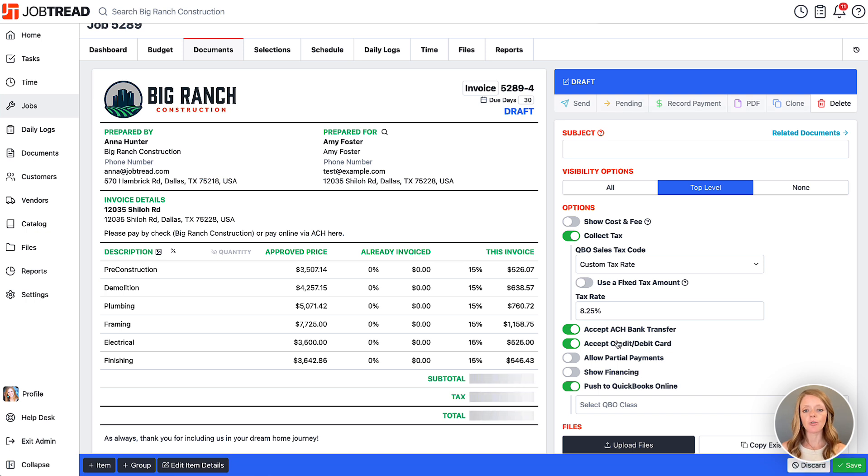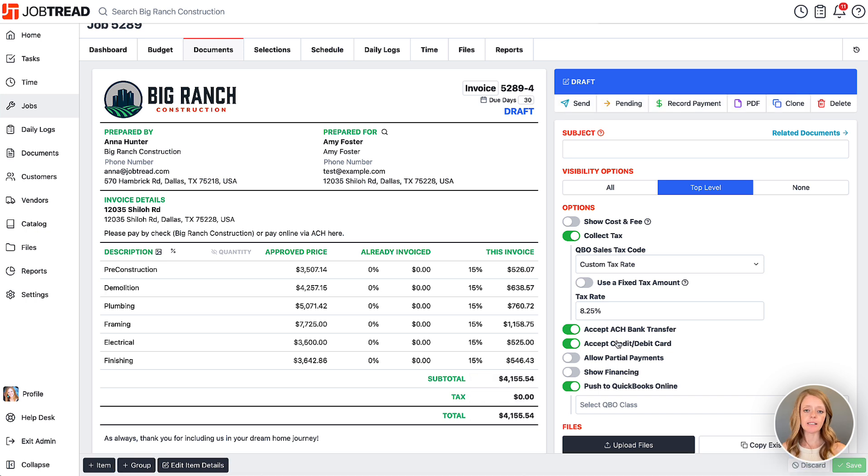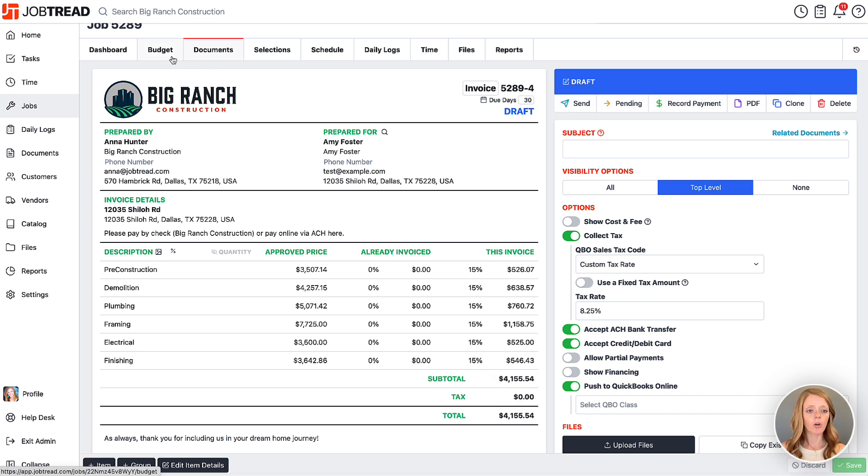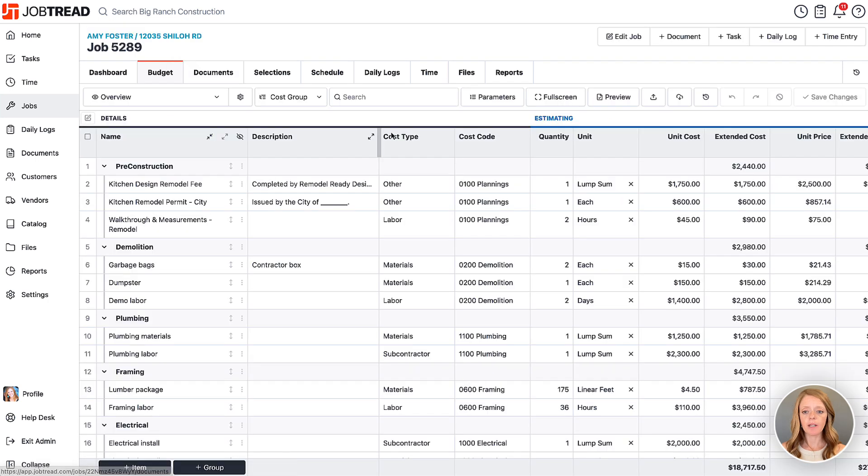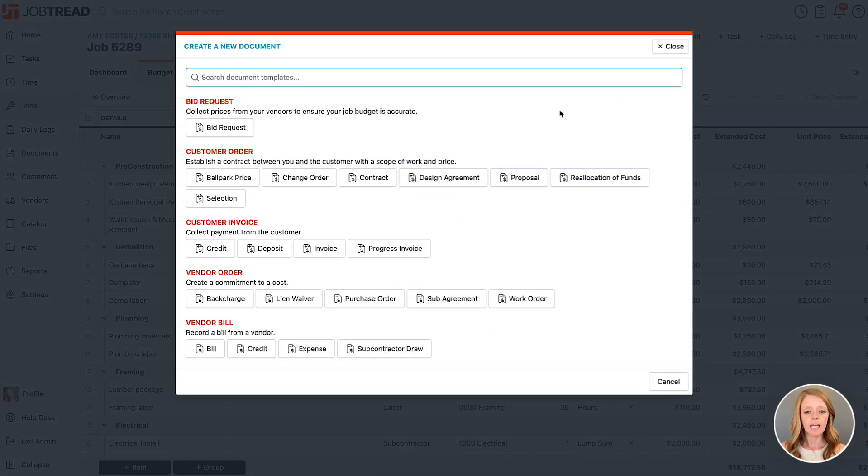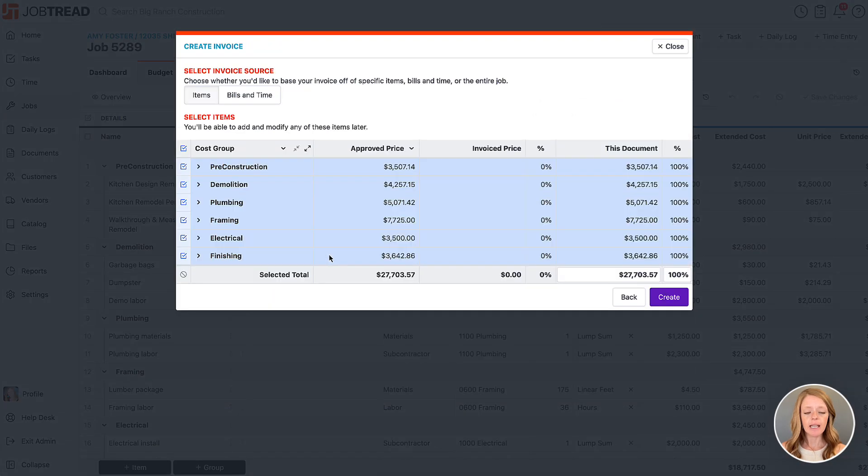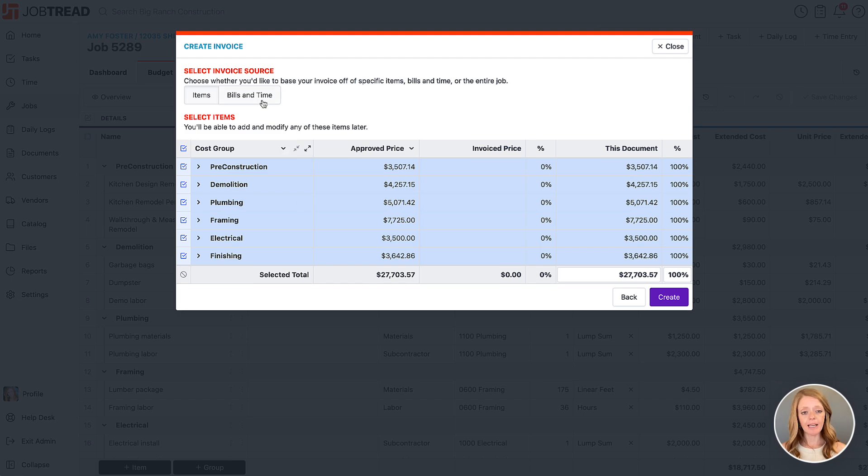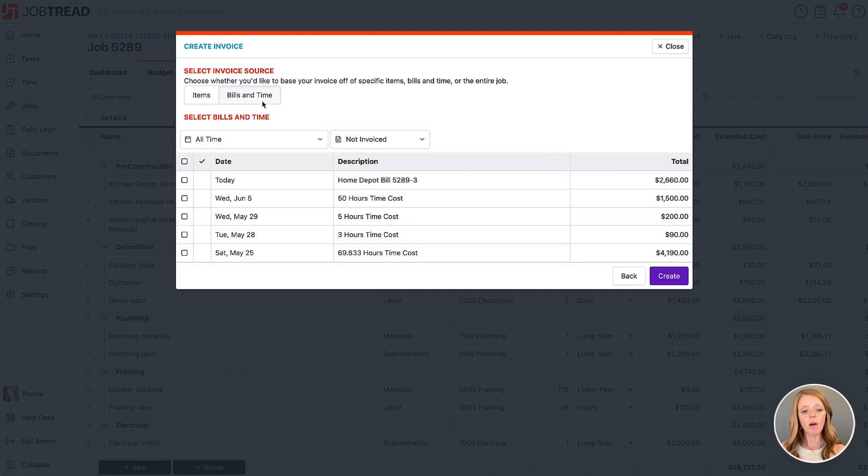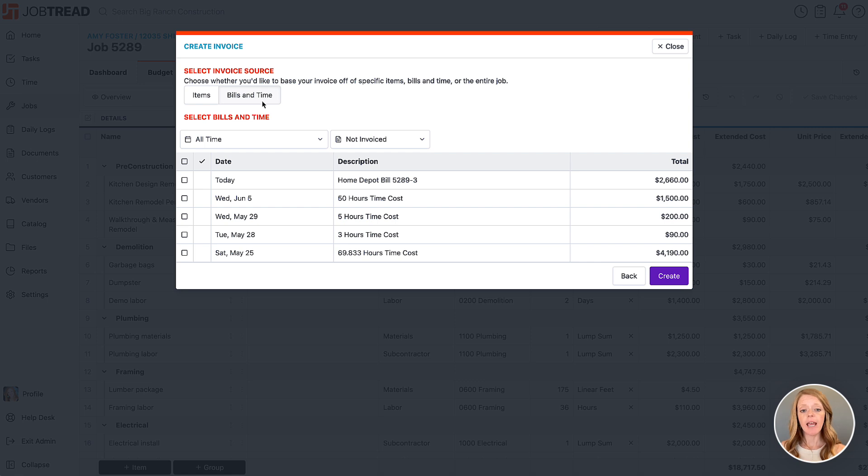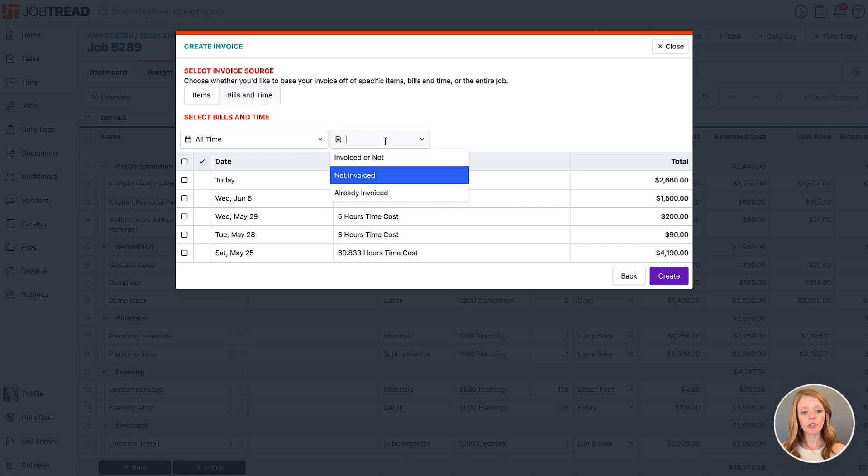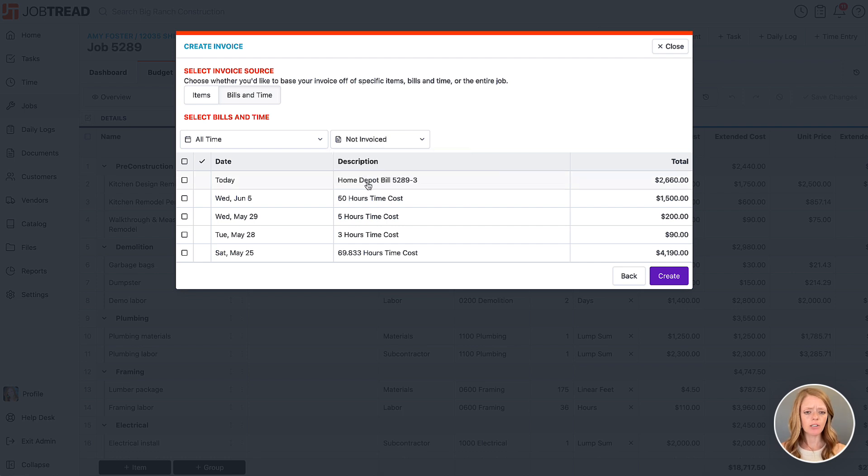Let's go ahead and create an invoice that is more for a cost plus one though. We'll go back to our budget and I'm going to click plus document and choose our invoice. Now if you're doing cost plus, you're going to choose bills and time. That will allow you to pass along any bills that were created and any time that was logged within this job. I like to use these filters so you can see exactly what was invoiced versus what has not been invoiced yet. Currently nothing's been invoiced, so we're just going to choose the exact bills and time that we would like to pass on to the customer.